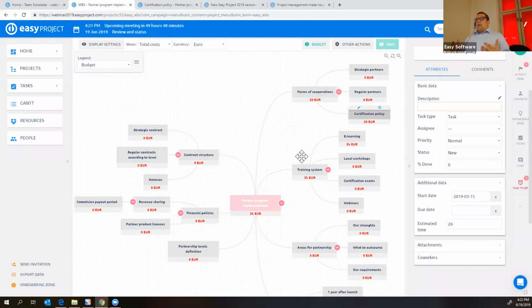So this innovation in finance management, two things to sum up. Possibility to record, watch, observe costs on task level through my rates, but also through other inputs of expenses or incomes, which can now be done on task, and then the numbers are aggregated on the project level.